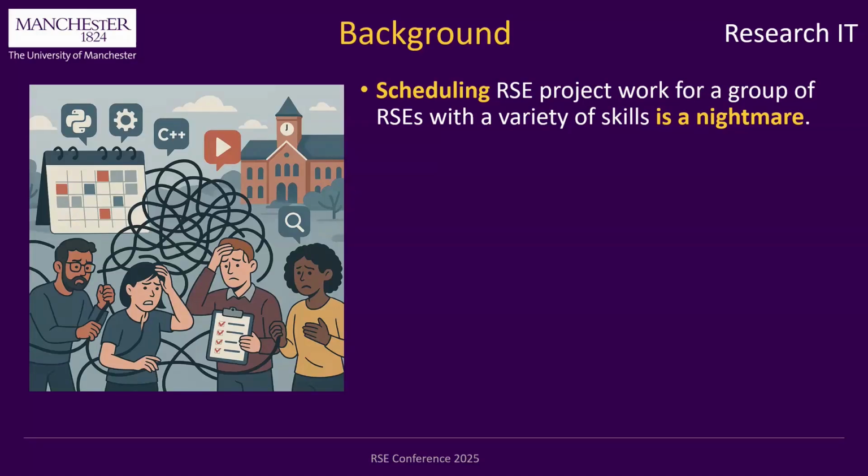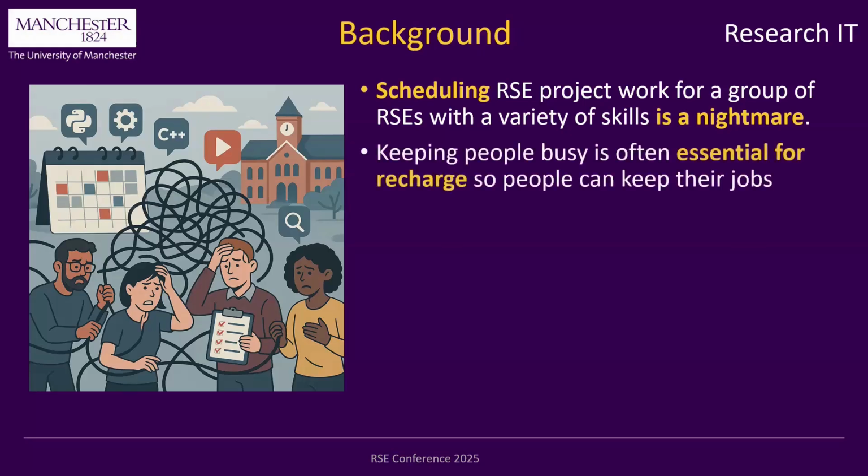You've got to make sure that there are as few gaps as possible, and those gaps are small, because most of the group's existence will require you to recharge their time. And if you're not very good at this, there's going to be large proportions of time that are not recharged, and finance people don't like this. So we don't want to get to a position where they start telling us to shed posts because people cost too much money when they're not busy. So this is an essential activity to really understand, this sort of what we call Tetris of fitting all these blocks into people's available time.